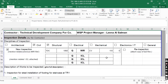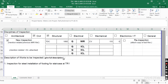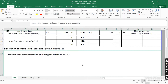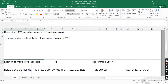Here write the WIR number again. If you have an inspection checklist, write the inspection checklist number here. Now for the description of work — for example: 'This WIR is for the steel installation of footing for staircase at Terminal 1.' You write the description of what you are submitting the WIR for — steel installation of footing, inspection of steel for columns, slab, beam, soil compaction testing, concrete casting — whatever the inspection is, write all the full details in this description field.